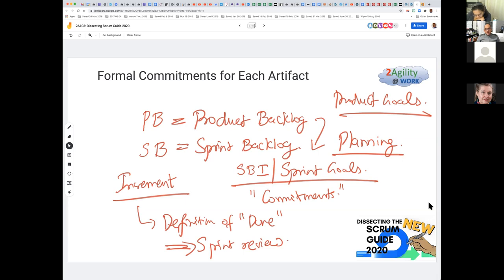A definition of done is that it works on the emulator right now, and that might evolve. A couple of sprints later, you might have a beta version of the hardware, and your definition of done would be, instead of running it on the emulator, now I'm committed not only to test it on the emulator, but also on the beta version of hardware that the hardware team has provided to me, so that the software is validated as working on the hardware that we are building to ship, including the actual sensors on Fitbit.